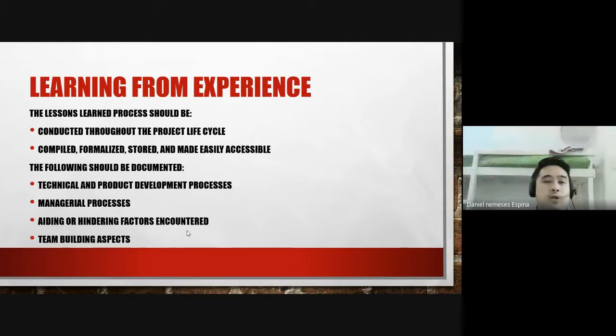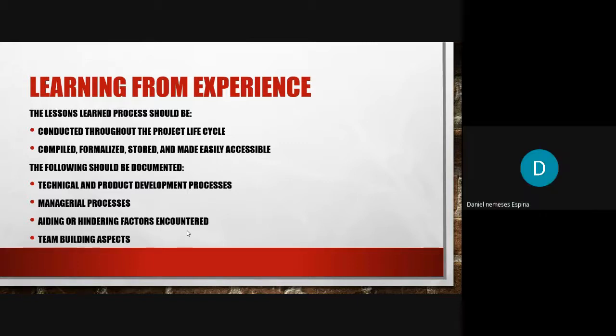This should be accessible not only to your team but perhaps to the next project team members, so those who follow will know what to do. So the following should be documented: technical and product development processes, managerial processes, aiding and hindering factors encountered, and team building aspects.